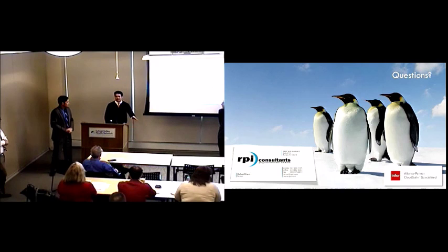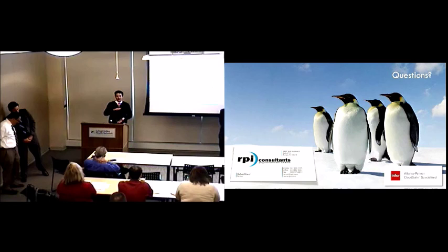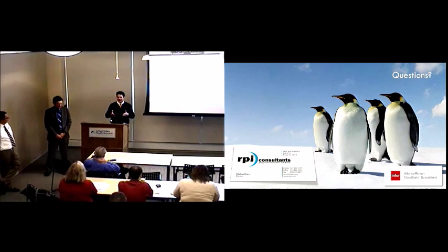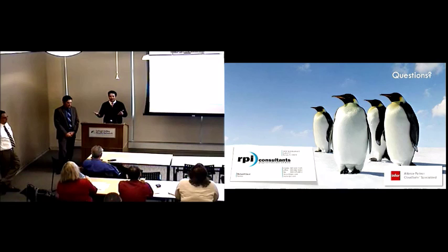It's also, how do you measure that, right? The first pass might be a process with 100 steps, and it takes us maybe a week to do those 100 steps. But if you start and stop the stopwatch on each of those steps as if it was go-live weekend, it might be 14 hours, right? Then we develop some tooling that we put in the second pass, which takes 4 days, but really the system's only churning for like 24 hours. So it depends how you measure it.